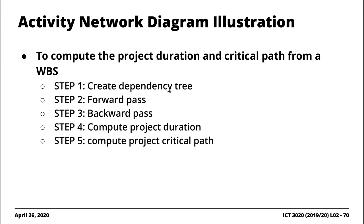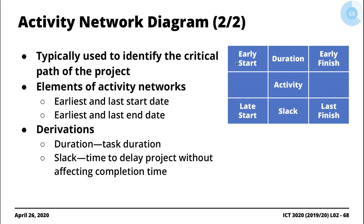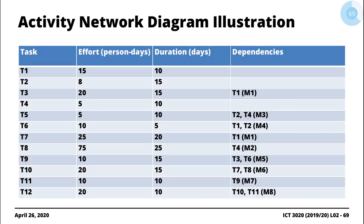The process is: first, create a dependency tree for all the tasks; then go through a forward pass to compute the duration of the project; then go through a backward pass to compute the slack associated with the different activities. Once done, we compute the duration and identify the critical path and slack values. During the forward pass, we compute the early start and early finish dates; during the backward pass, we compute the late start date, late finish date, and the slack.